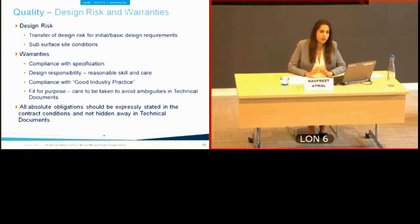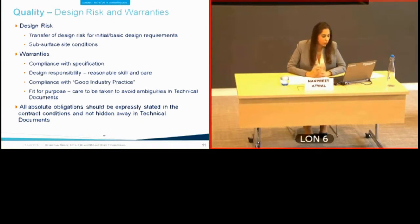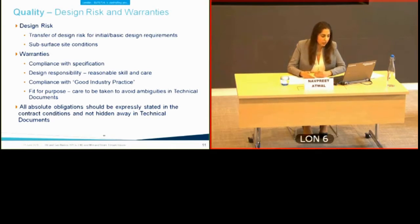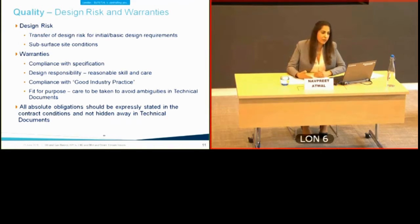Sitting above all other warranties is a fit for purpose warranty — an absolute obligation that the lender wants to ensure is not diluted by lesser obligations buried in technical documents. Any warranties relating to the facility must be elevated to contract level and sit up front in the contract terms, not hidden away in technical documents. This requires working closely with engineers to ensure consistency.